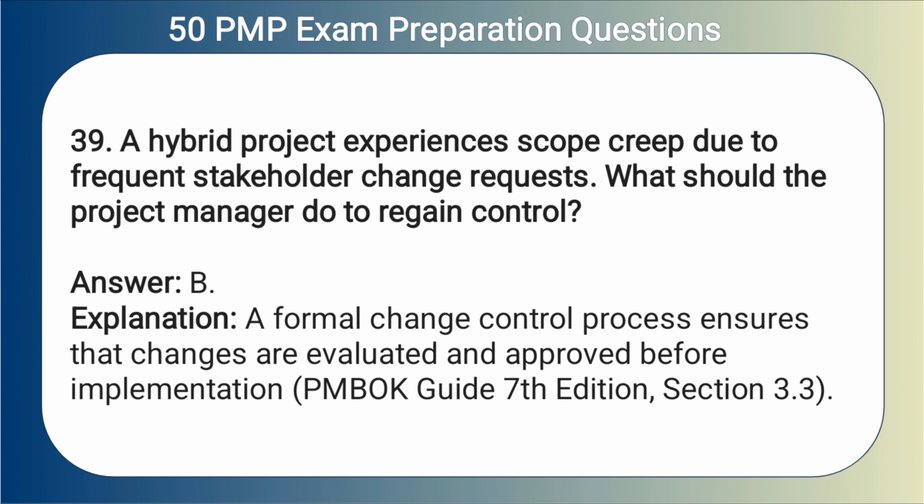Answer. B. Explanation. A formal change control process ensures that changes are evaluated and approved before implementation.